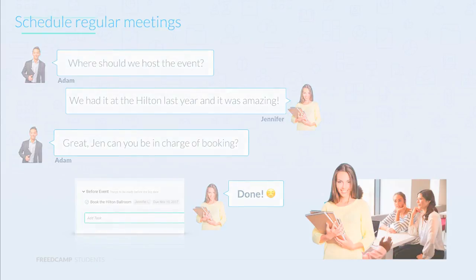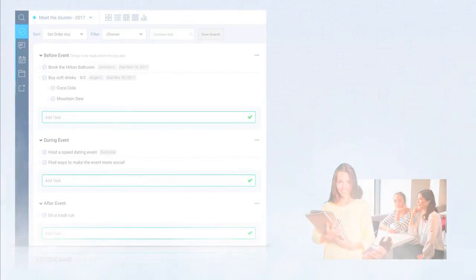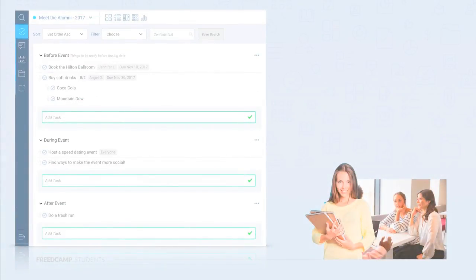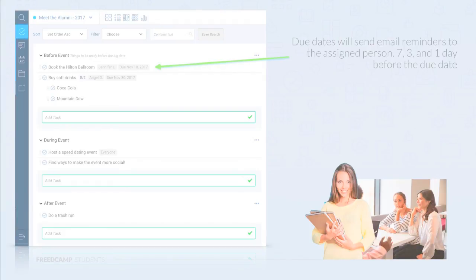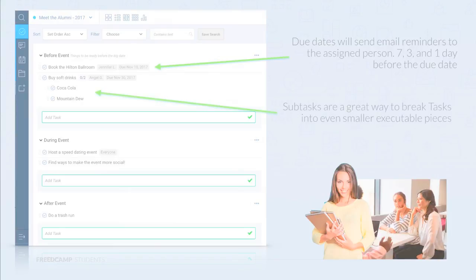After the meeting, the project was now live and up to speed. People knew what they had to do to make the event a success. Due dates are important, as they will remind the person the task is assigned to seven days, three days, and one day before the due date. Use subtasks to split larger tasks into smaller chunks that could be assigned to other team members.